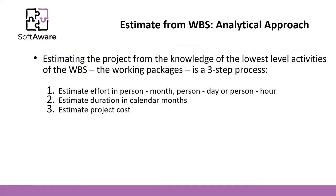It is a three-step process. The first step is to estimate effort in person-month, person-day, or person-hour. After that, estimate duration in calendar months, and then estimate the project cost. Note that the measure you use — person-month, person-day, or person-hour — should be the most useful for the project.